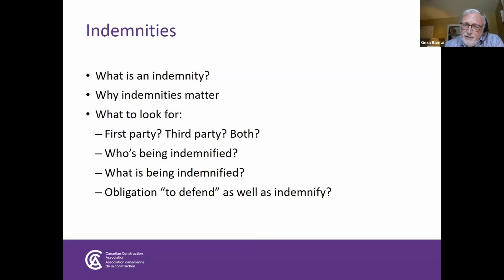That word defend is loaded with meaning and potential problems. As a practical matter, the obligation to defend includes, as you'd expect, the obligation to hire a lawyer, hire experts, and defend, potentially through a trial. That could be a very expensive proposition for the GC or indeed the GC's insurer.